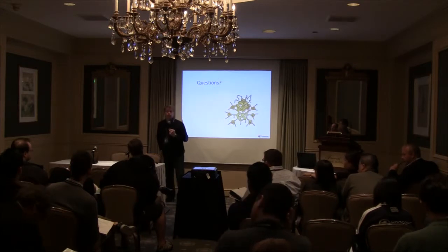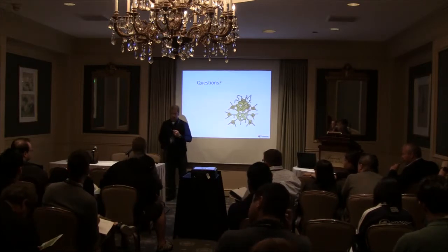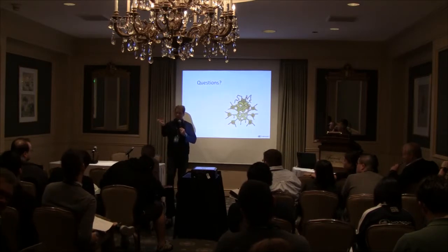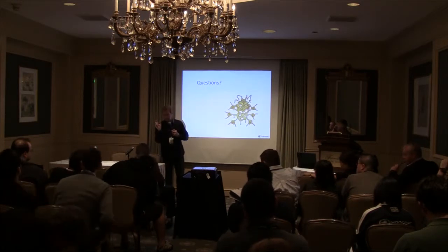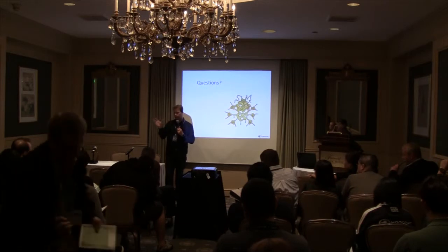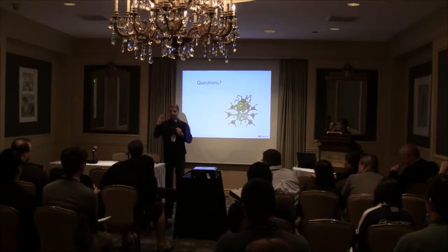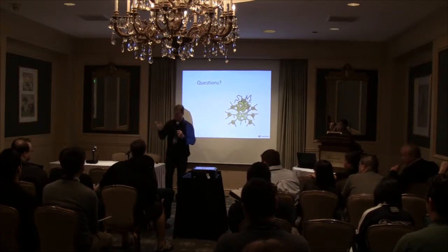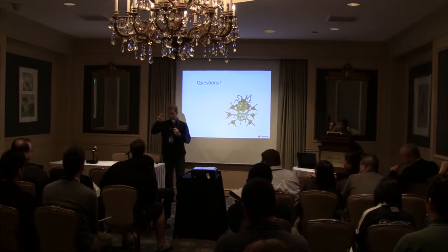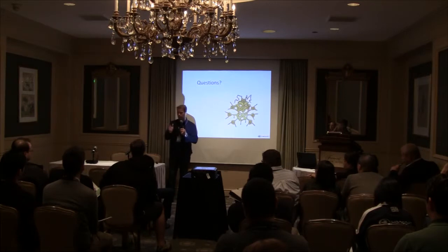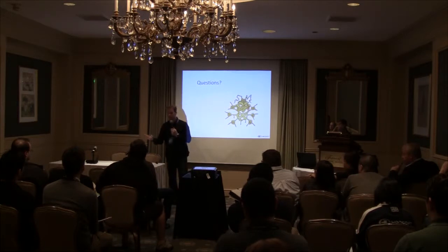It all depends on your product. A sprint is a time-boxed piece. You could do a release after each sprint, or oftentimes a release will contain many sprints and many teams. On a traditional Gen 3 title, you might have 20 sprints culminated inside a single release. On the Facebook products I've developed, every week we had a sprint, and at the end of that sprint, we released that content.